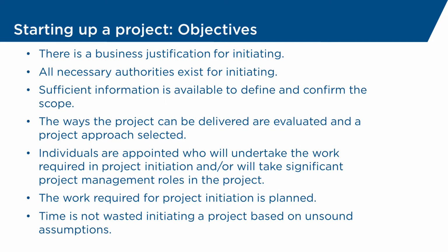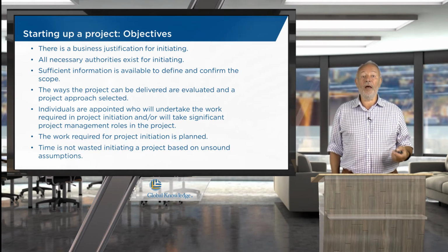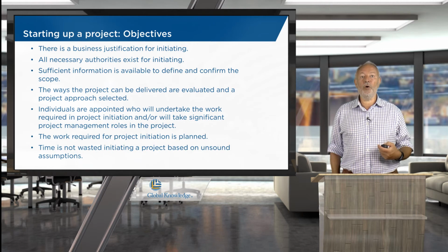We also need to consider the work that's going to be carried out during initiation. So this is when we're going to be doing our planning, the next step, the initiation stage. And this way, we're assuring that we're not using lots of time and effort on planning if these circumstances don't exist. That we haven't got business justification, that we don't know what we're going to deliver, that we don't have the right people, we don't know how we're going to deliver. Now, generally, we're going to be carrying out the minimum work necessary to answer these questions. And this will then give us confidence to move forward into initiation.